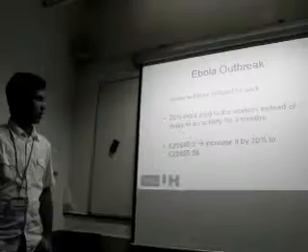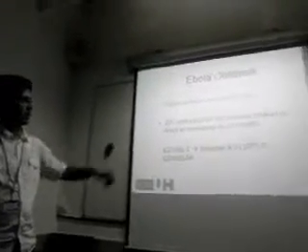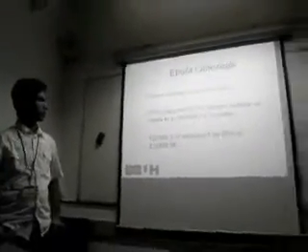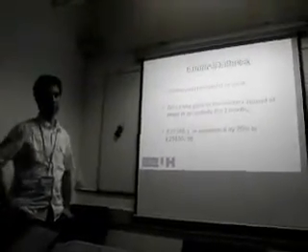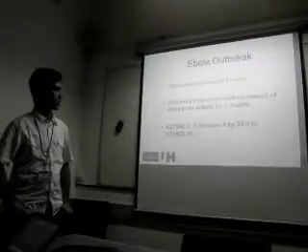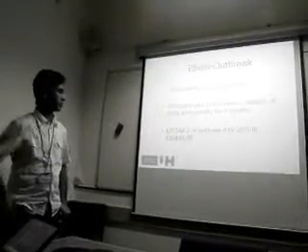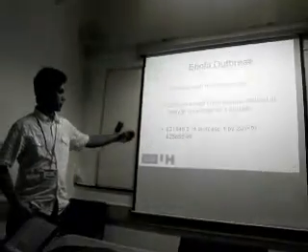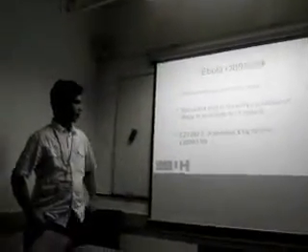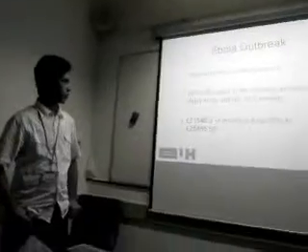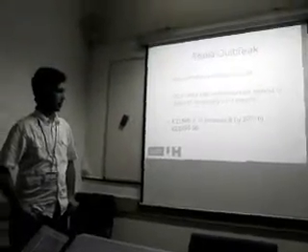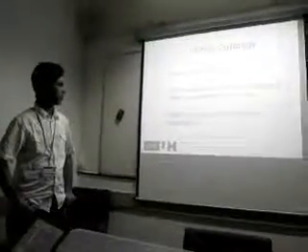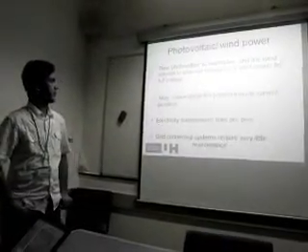If we select new workers, the project will definitely be delayed by about 3 months, and we want to finish the project early. So we go for the first option and pay them 20% extra. The initial cost was 21,546 pounds, and about 4,000 is added, so 25,085.55 is the new cost of the workers.